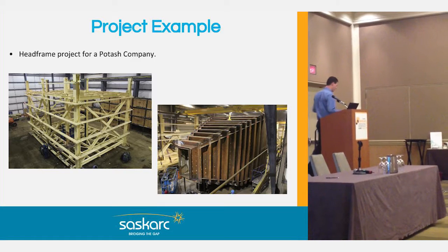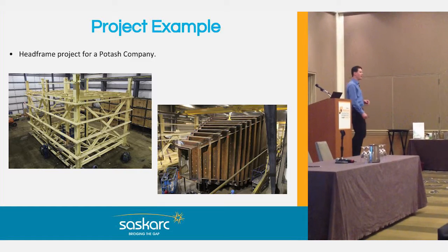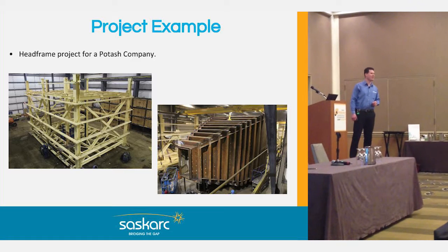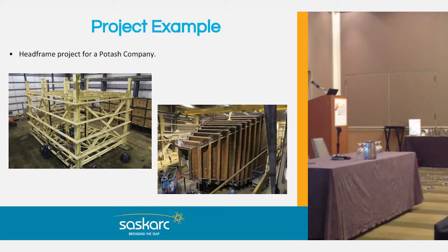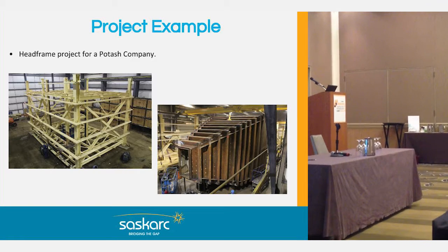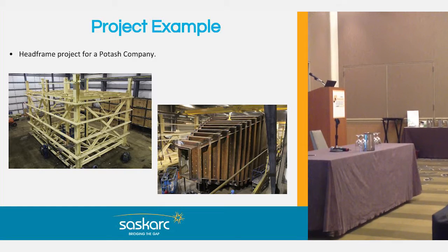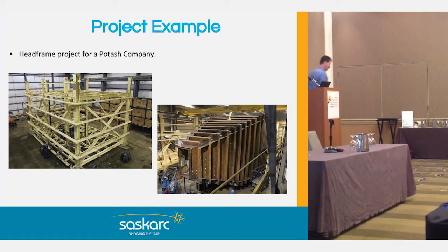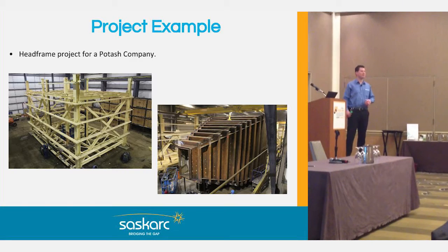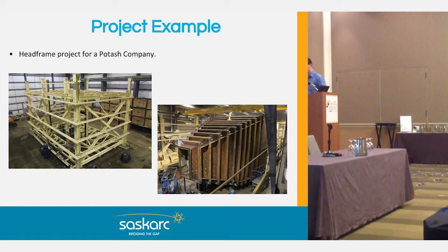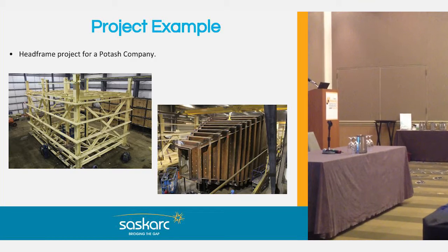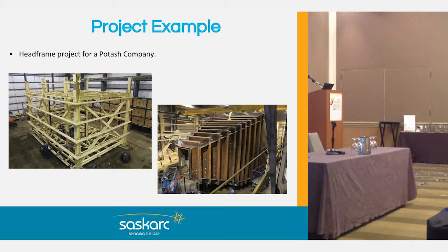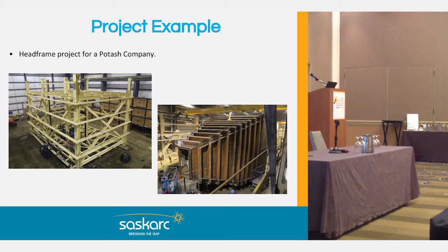And it was in a very remote location, during the coldest winter months of the year, which I think we can all relate to when it's minus 50 in Saskatchewan and the wind's blowing on you and the snow's falling down, and it can be very, very unproductive to work. So when we received the package, we looked at it with our team and saw the possibility of modularizing it, went back to them, and offered it as a suggestion and a recommendation. They came back, as we spoke to before, wanting the original price or quote as requested, as well as the modularized option.